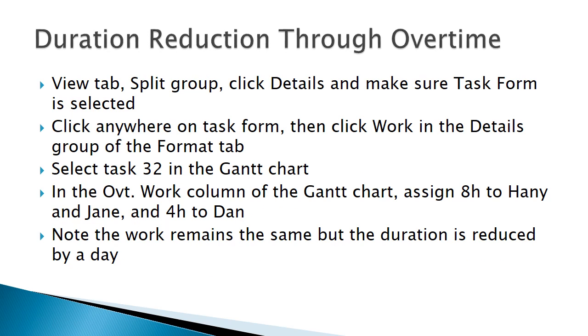This slide shows how you can apply overtime to reduce the duration of a task. Unfortunately, this isn't enough to bring the critical task in another day, so you may want to look at some additional overtime or other corrections if you don't want to miss that deadline.